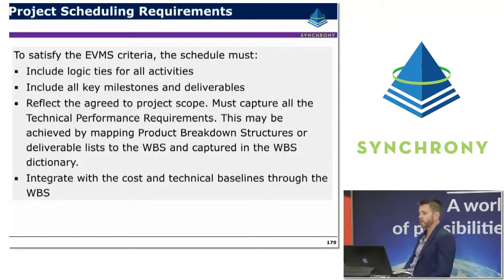So the project scheduling requirements, in order to satisfy the EVMS criteria, the schedule needs to include logic ties for each activity. So that's part of the testing, I guess, assuring the EVMS system is making sure that the schedule is linked appropriately. Include all key milestones and deliverables. Reflect the overall project scope and capture the technical performance requirements.